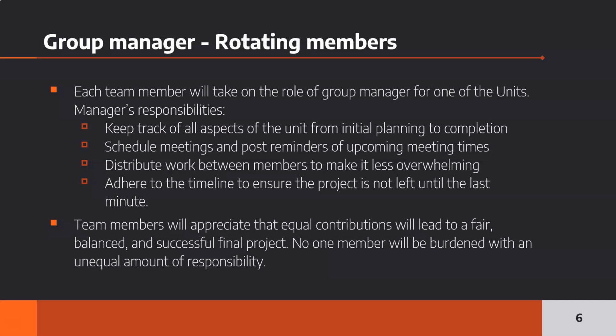Begin by selecting a group manager. Oftentimes, team members will volunteer once they realize that each person will take on this role for one of the units. The manager is responsible for keeping track of all aspects of the unit from initial planning to completion, scheduling meetings and posting reminders of upcoming meeting times, distributing work between members, and adhering to timelines to ensure the project